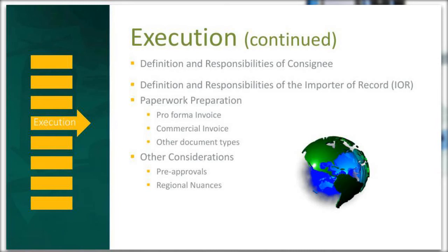So it's critical when exporting your ancillary supplies to another country that your recipient, or in this particular case we'll say the consignee, is registered with the country customs as a registered importer. If your consignee is not a registered importer, the shipment will be placed in customs clearance delay or a hold pattern until a proper registered importer is assigned in country. Country customs assigns tax ID numbers to an individual or a firm or a legal entity that will be responsible for articles of trade from a foreign source into their domestic market in the course of a trade.